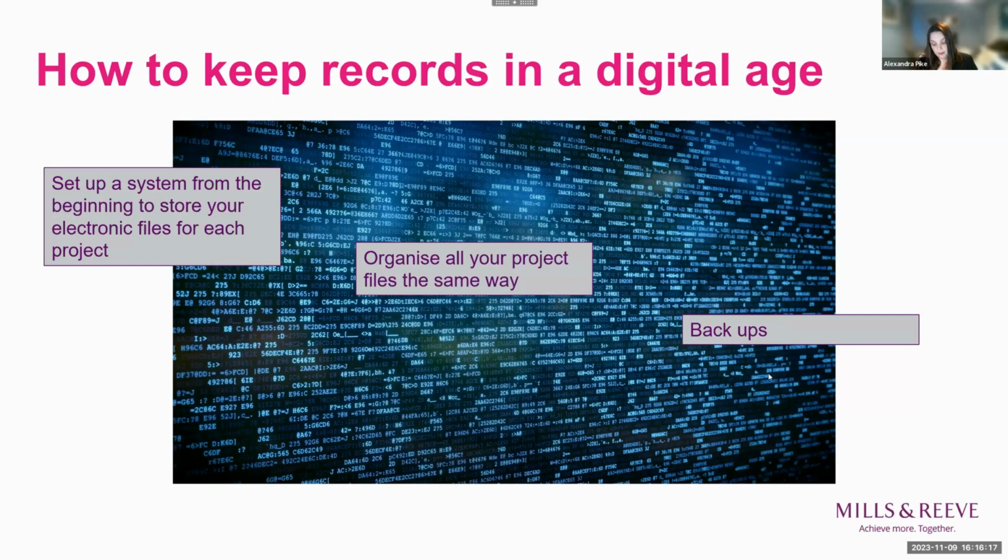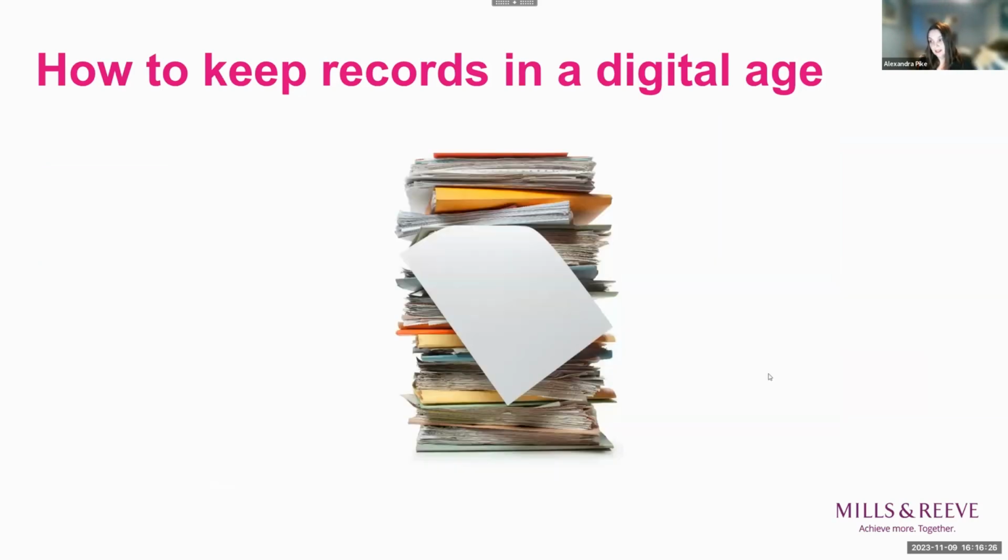It's helpful if you can think about, while the project's going on, what you would do in that circumstance and actually work out for you what's best. And so really my top tip is to think about paper actually and how that can be helpful to you. And very often for people that's your site diaries, and having those available to actually refresh your memory and piece the story together and act as a contemporaneous record where emails sometimes don't always help. So I will leave you with that thought.